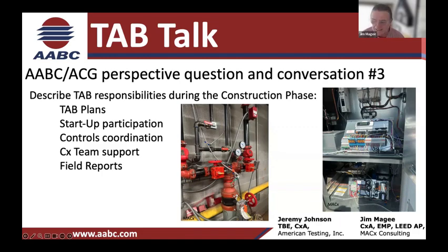And the TSB has this whole series of different kinds of plans. Of course, you have an engineer that's on top of the job, but then you have a TSB report format that's supposed to be out, a TSB plan, which includes HVAC procedures, the TSB interface with the mechanical, electrical, and specialty contractors, construction plans and specs, where you integrate the scheduling, and then field observations and field.